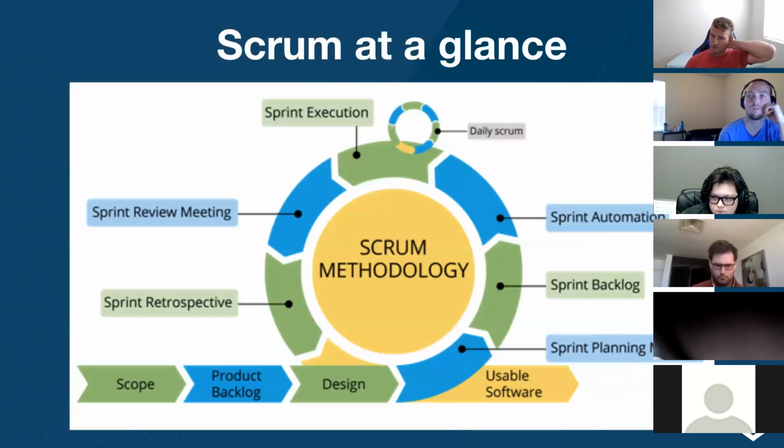And then we have a sprint planning meeting. So the whole team comes into a room and looks at all the tickets that the project manager and the design team have gone through, and your team will estimate how long each ticket should take and put it into the development backlog, and then talk about if anybody sees any problems with a certain ticket.